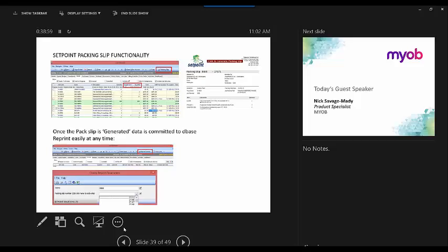So we've had issues around that, so I developed a trigger. We've got a trigger in place for that now. I've got a report that I run. I actually run it weekly, and I get my offsider to do it for me now. That is items not supplied on a job where the status is invoiced, and she just goes through and supplies them all against the invoice. So that's one way we've got of dealing with our WIP, because we've got the multiple branches.